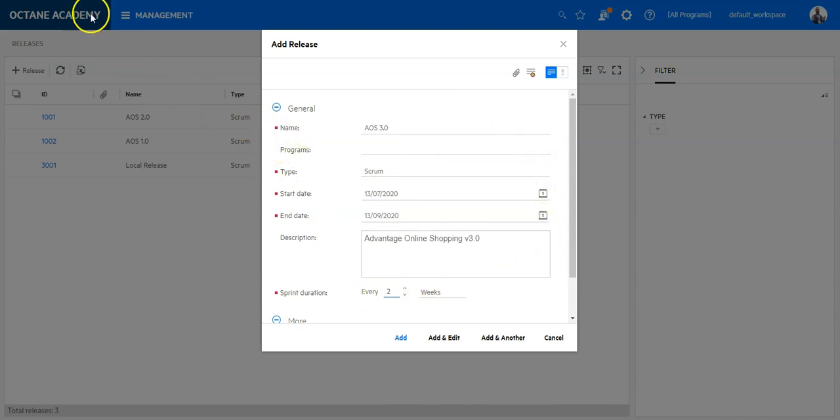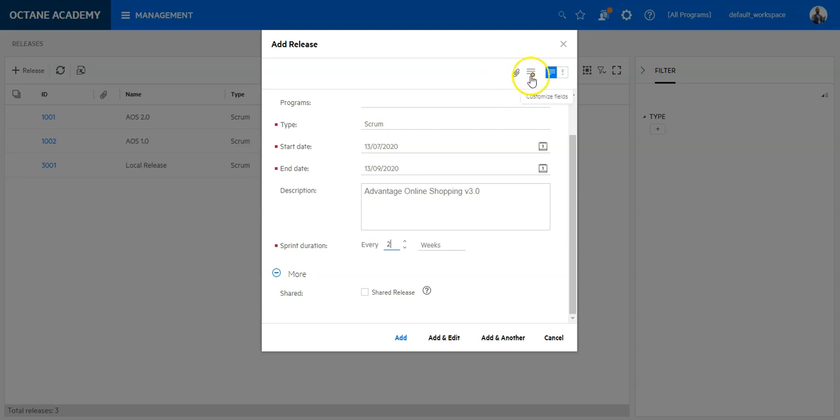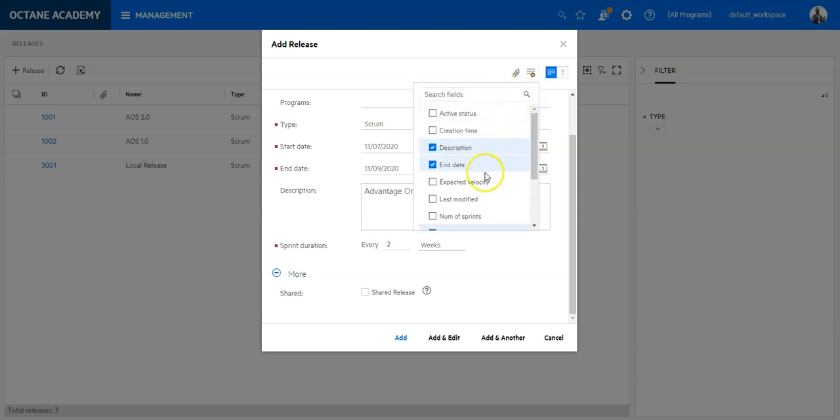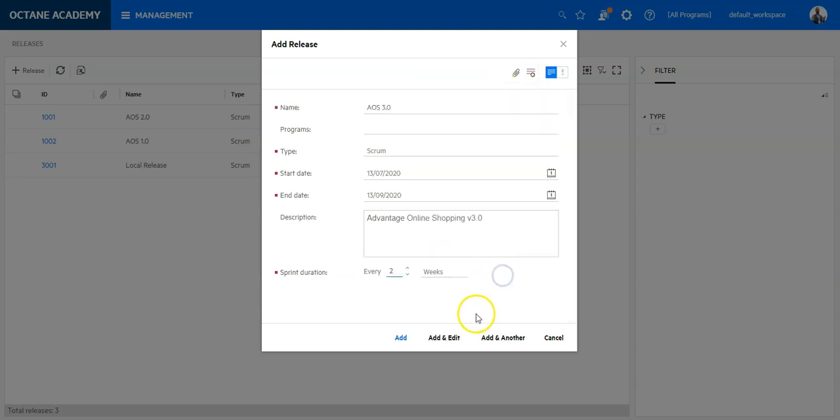Currently what I have created, or will create, is a release which is only valid locally for this workspace. But I can also decide to have shared releases, meaning this release will not appear only here but will also appear in additional workspaces which are part of my shared space. This is a great way to implement global releases—global timelines for your whole organization where you should know when to deploy something or when not to deploy. This is a great opportunity to engage with multiple workspaces as well as displaying what is going on at the organization level.